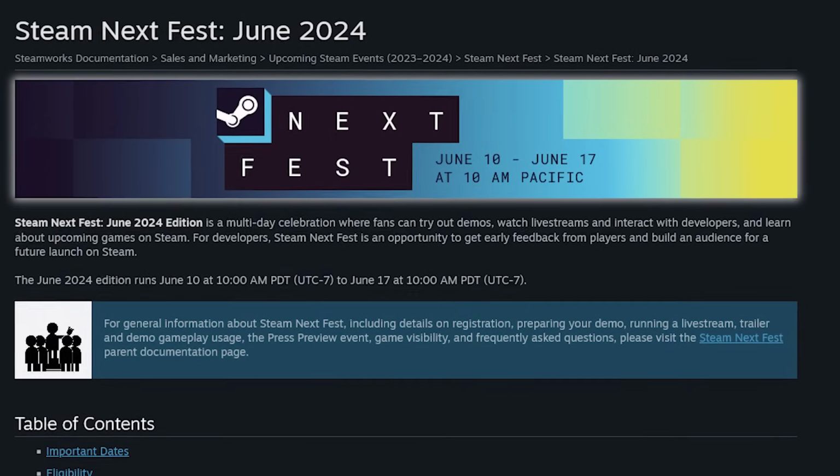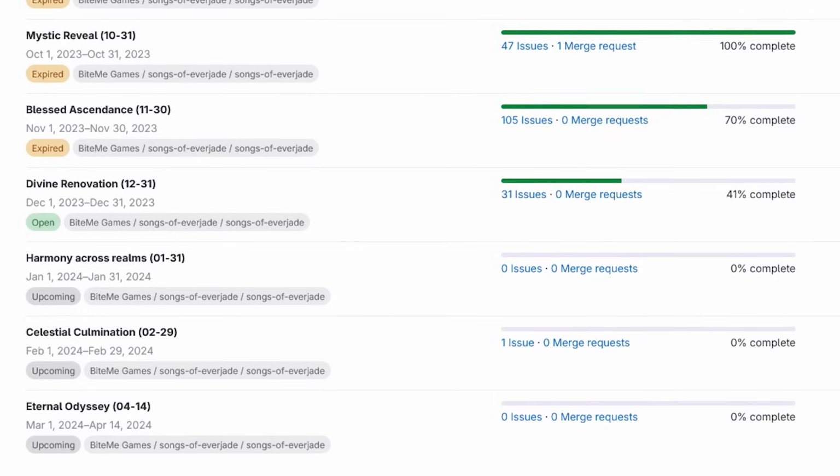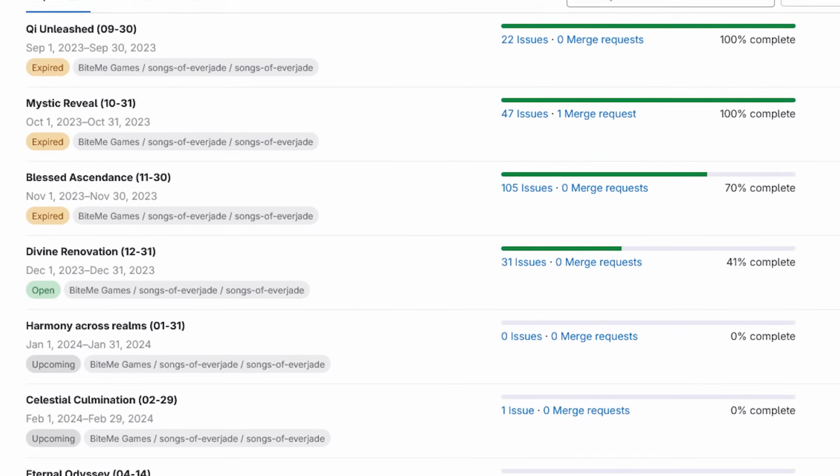Whatever date it is, put it in your calendar of, okay, in October this year, I'm going to be part of Steam Next Fest and I have to have a demo for that available by then. And then I want you to start back planning. So instead of looking at, okay, what am I going to do next month first? Look at all the different things that need to be done by the demo, and then see, okay, I'm going to need probably a bunch of items and content or whatever. I'm going to do those 2 months before the demo. And then 2 months before that, I'm gonna be finishing up these mechanics, and then 2 months before that, these are core mechanics, those should really be done.